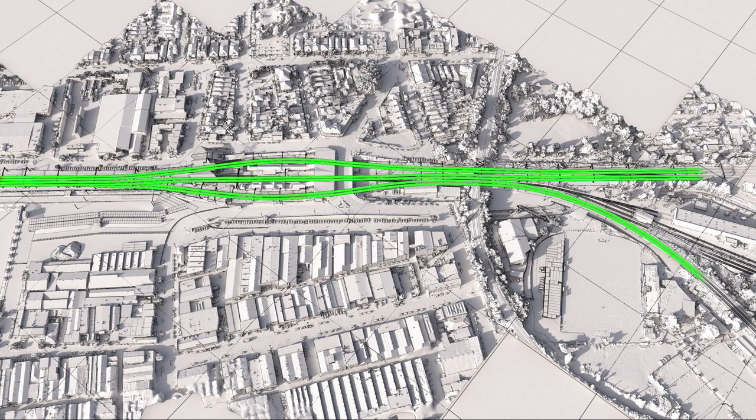The temporary shutdown will be delivered under 2 different shutdown arrangements. The first part of the shutdown will commence at 2000 hours on the 24th of December 2019 and finish at 1000 hours on Saturday the 28th of December. This will mean no booked train services on all 6 tracks at Sydenham Junction. The shutdown will have a full high voltage and 1500 volt electrical isolation of all 6 tracks.